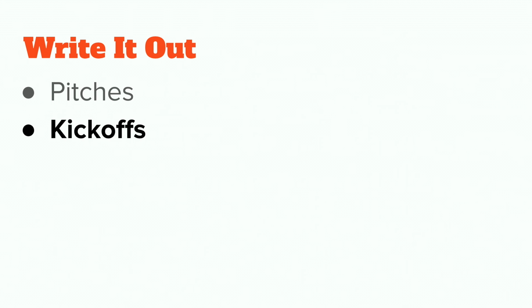So we also have a part of the process called Kickoff, which is before each 6-week cycle, where we write kind of like a statement of work. These are the projects that we're going to work on. Some of it might be fixing bugs from the last cycle, or it might be tackling new work. But really it helps us promise, okay, this is what we're going to do in these 6 weeks. And we try to be as realistic as possible. We don't shoot for the moon. It doesn't matter how many things are in there, as long as we're really able to do it.